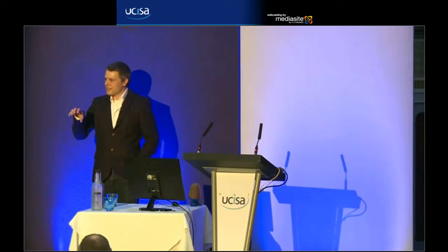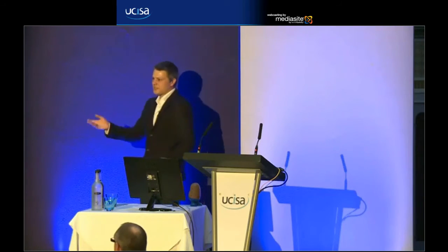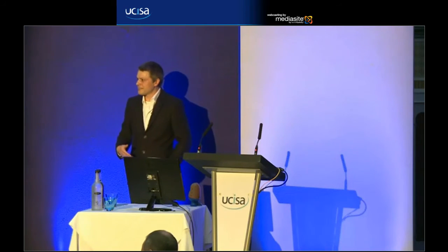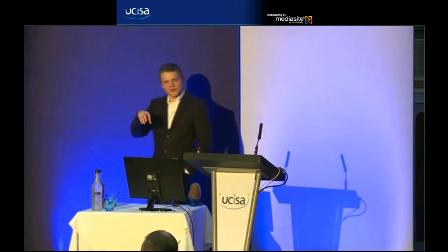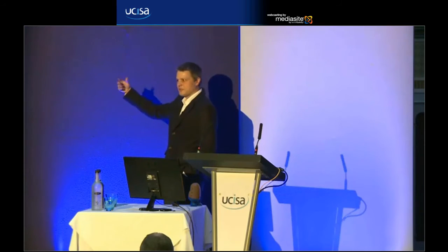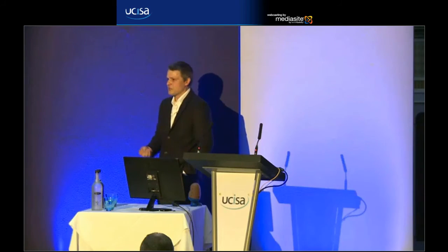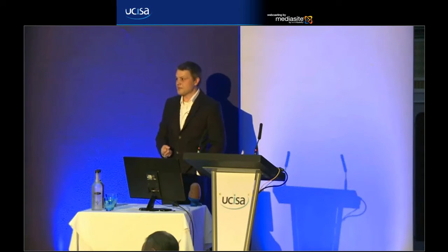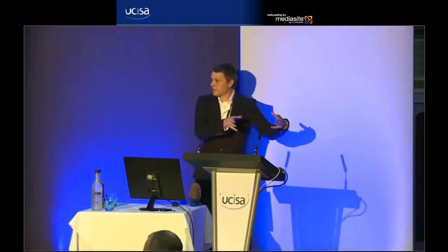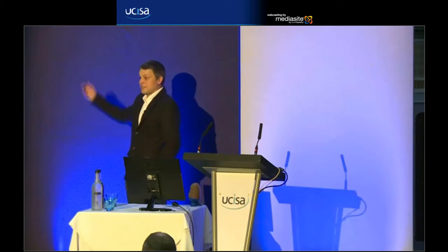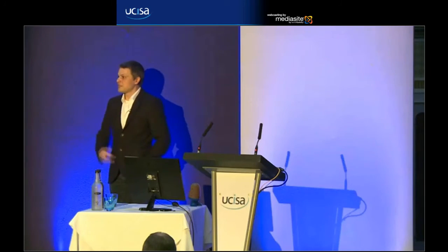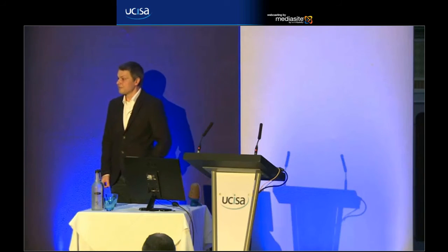The cards themselves then can be used on a Kanban board. As I say, we use an electronic system for it. The customer can see those. They can add, the stories aren't fixed at the beginning as well, so we explain to the customers and everybody who we're working with that we can add in additional requirements at any point. They go into the product backlog and are sized and prioritized along with the rest of them so that we can then pull those stories in. But yeah, effectively, it's something like this. We go through this type of presentation and then facilitate the sessions with them.